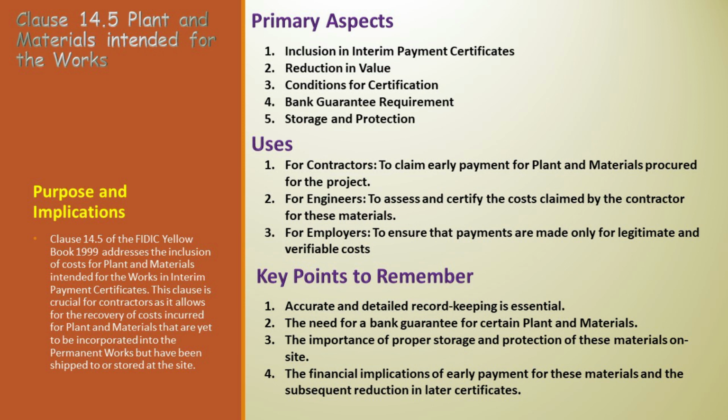Importance of proper storage and protection. The clause emphasizes the need for proper storage and protection of the plant and materials on site. This requirement safeguards the materials against loss, damage, or deterioration, ensuring their usability when needed for the permanent works.